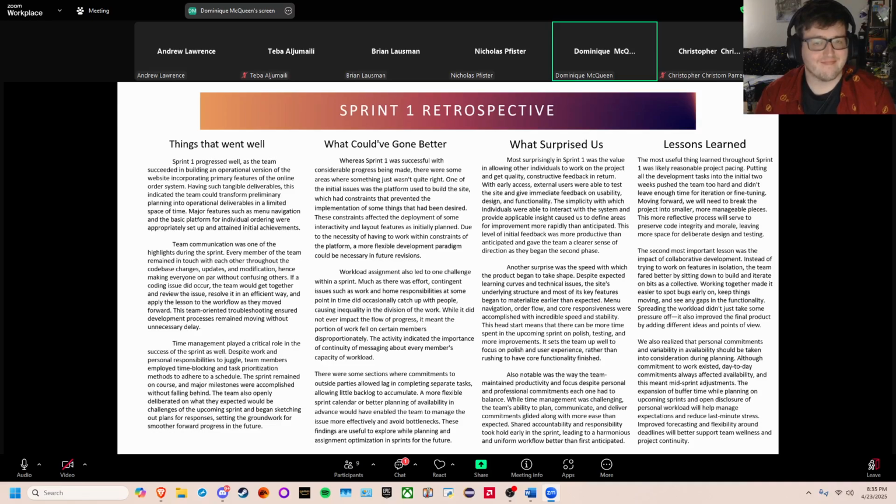And finally, under lessons learned, we recognize the importance of pacing and breaking the project into smaller, manageable chunks instead of front loading all the work into the first 2 weeks. We also learned how helpful it was to work as a team instead of in isolation, since that approach made it easier to catch bugs early and keep the project moving.